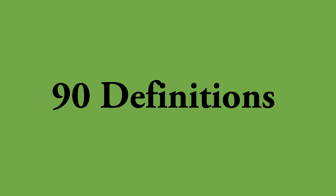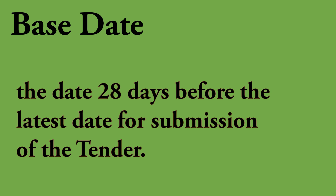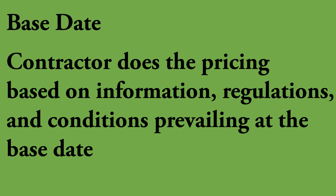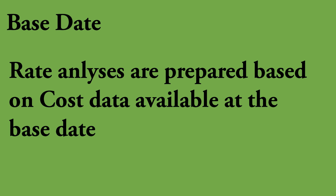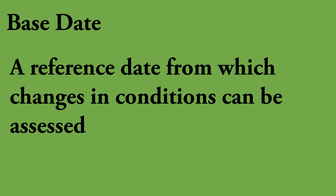There are 90 definitions altogether, so I'm not going to describe one by one, and I will skip the straightforward ones. Let's start with 'base date', since we will be discussing Advance Payment Certificate and Guarantee under clause 14. Base date is the date 28 days prior to the latest tender submission date. If the tender submission date is extended, then the base date automatically changes accordingly. This base date is vital because the contractor shall do the pricing by considering the information, regulations, and conditions prevailing at the base date. The rate analysis for the project is also prepared with cost data available at the time of the base date. So the base date is generally used as a mechanism for the allocation of risk between employer and contractor for changes that might occur during the period between the contractor pricing the tender and the signing of the contract. In general, a base date is a reference date from which changes in conditions can be assessed.